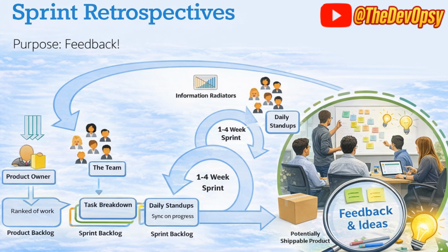Retrospectives. This is very, very important. This is the discussion where you actually understand and say the purpose of your retrospective is to have the team members provide feedback to the team. Like your team members will be providing feedback. As somebody mentioned, the QA team did not estimate the story points correctly. They estimated it two, but it was eight story points or maybe more than that. So next time, QA team, please be cautious about it.